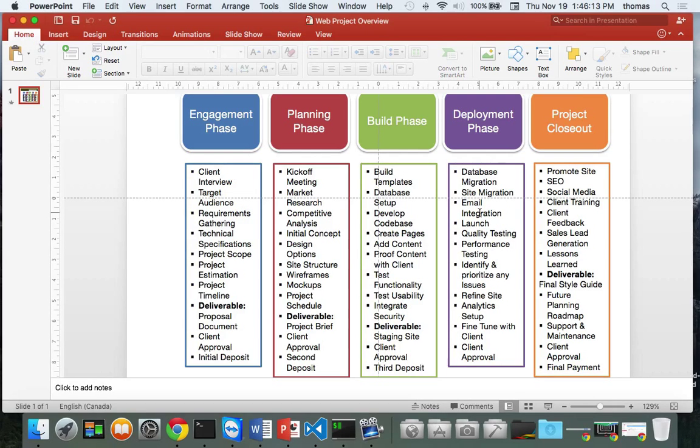So if you can't do it on Friday for whatever reason, you tell the customer, I've scheduled it for Friday, but if I have any problems, worst case, Monday we're deploying, right? And the reason for that is we want to give ourselves a bit of slack in terms of any kind of possibilities that come up, right? So that's when we actually deploy to the live site.